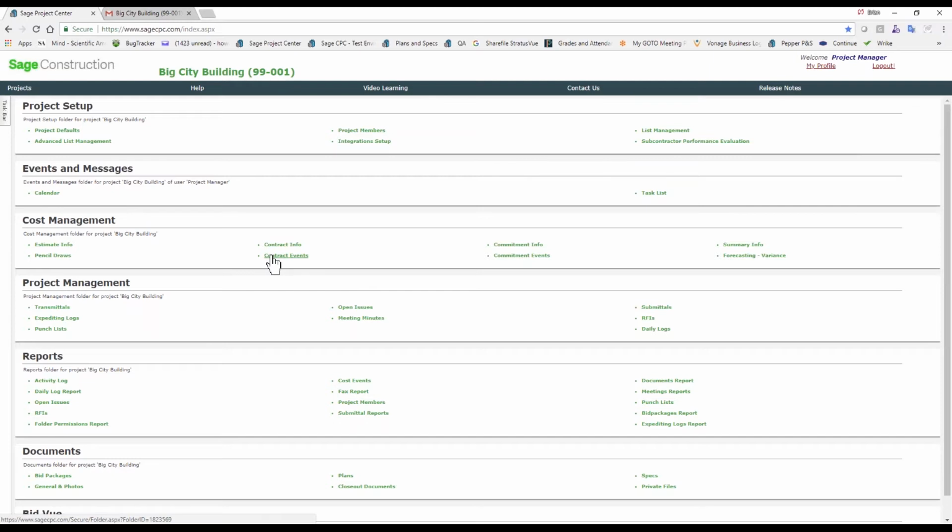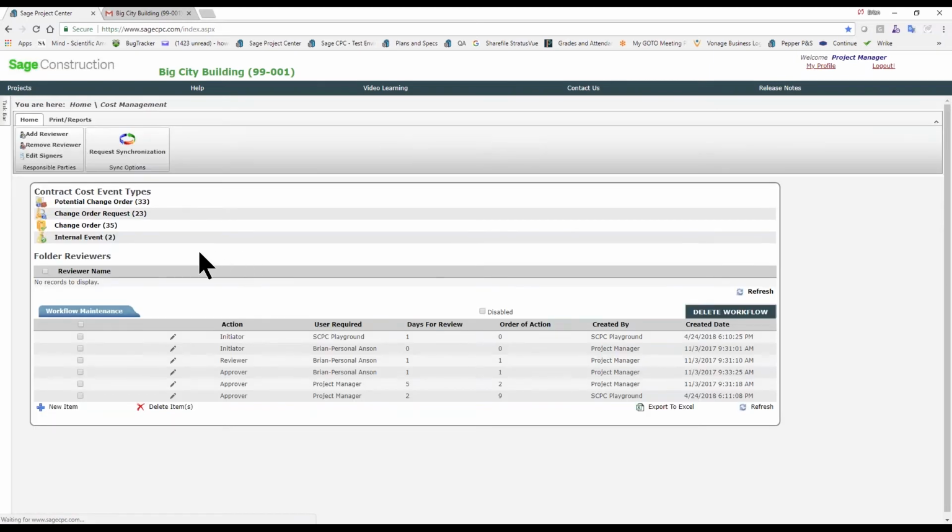Going through our change orders, we have contract side change orders and commitment side change orders. So your contract change order is going to affect your schedule of values and your budget. I'm showing 4 here, but we actually have 9 different ways you can do change orders. We don't care how many steps you do. You can go from a 3-step PCO, COR, CO. You can write change orders right away. It doesn't really matter. Again, whatever your SOPs are within your company, and if you don't have any, we'll help you through that.